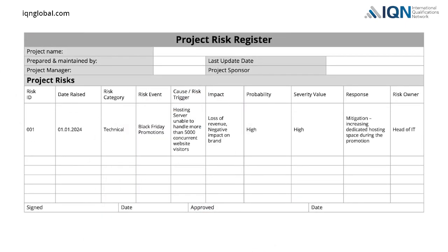The register includes details about the risk event, risk trigger, impact of risk, probability of the risk, severity, response plan, and the name of the risk owner.